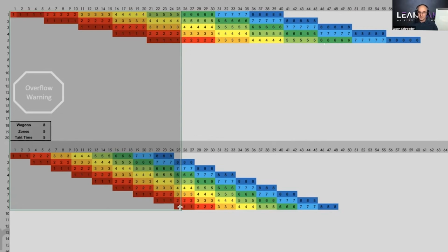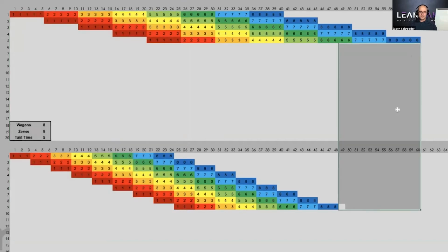You would sometimes give them more. You have a faster overall phase. You get done faster. You have less GCs. You have more coordination, more flow. And when somebody's like, you stopped the line, which is a valid question, I'm like, yeah, bro, if I only have to stop this 2 or 3 days, I'm still 8 days ahead. That's 8 labor days of saving.